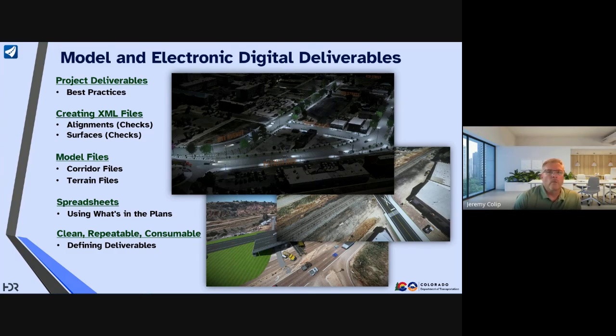So with that said, when we say deliverables to the contractor and model electronic digital deliverables, a lot of people start to get nervous. It's not that we're saying, okay, contractor, you can use everything. There's a whole lot of information that goes into that. For instance, we may say, okay, we've done the earthwork, we've modeled it, we've checked it this time, that time, and every other time. Okay, we're going to submit that as a deliverable to the contractor.